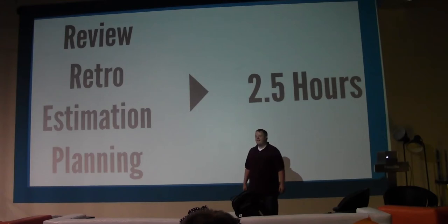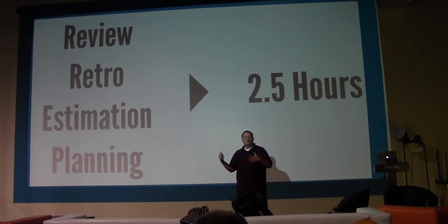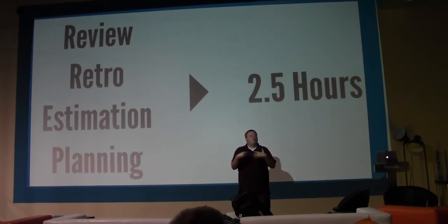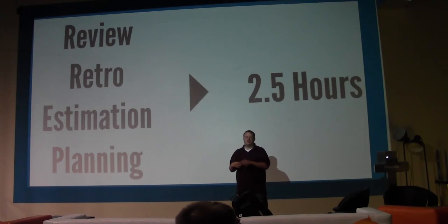Is your estimation meeting the same as a grooming meeting? Our product people will typically groom the backlog. The people in charge of the product have their giant queue, which we call the icebox for our organization. It's all the stuff you can, in your wild imagination, want to do. Every 1 to 2 weeks, they go through and groom it and say, what do we want to bring up to maybe do in the next couple weeks, and what's stuff we don't care about and can get rid of? It's amazing how much stuff you can accumulate in there.